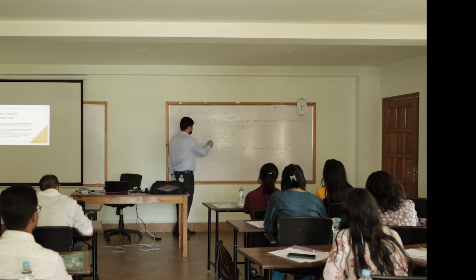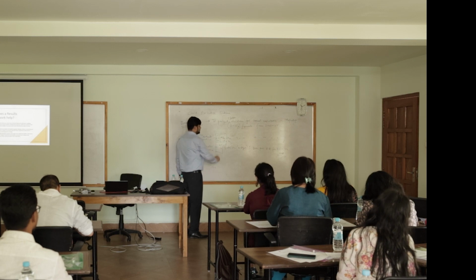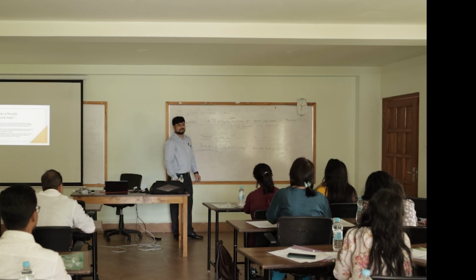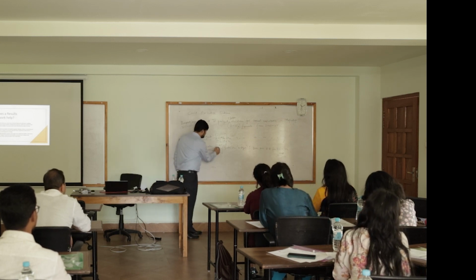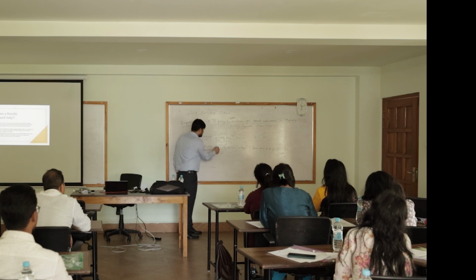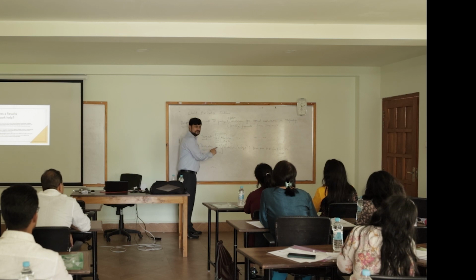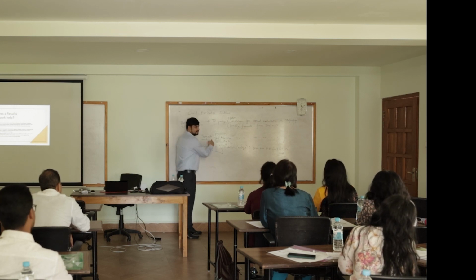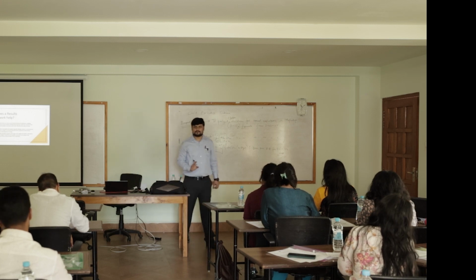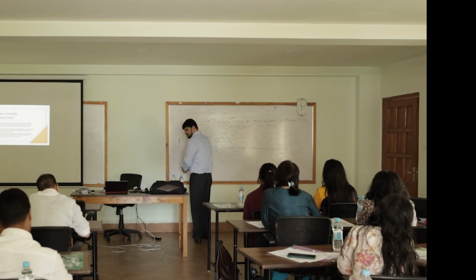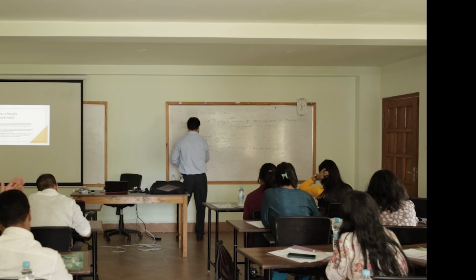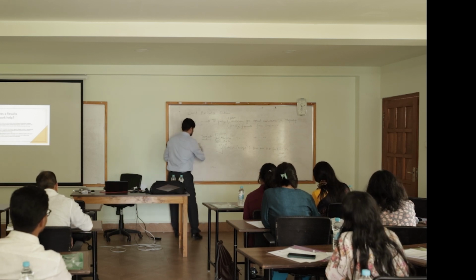And this is the target, wherein you are mentioning the numbers, the percentages, whatever. Here you haven't mentioned 20%. If you had mentioned 20% here, then it would not have been an indicator. Then it would have become a target. The moment you mention the number, it becomes a target. So good that we finalize on a target here. Great.